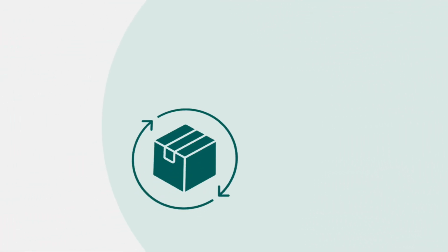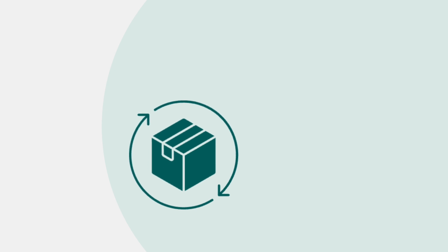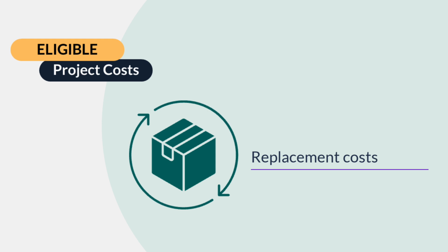There may be ECMs in your EPC that need to be replaced during the term of your EPC to ensure they continue producing EPC savings. These replacement costs are an eligible project cost, within the limits specified in the EPC approval letter.